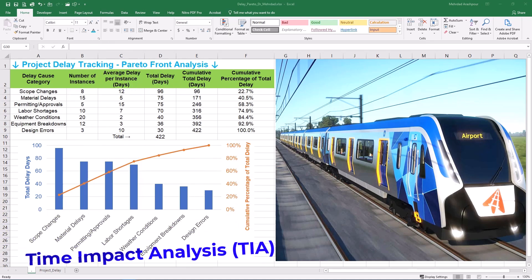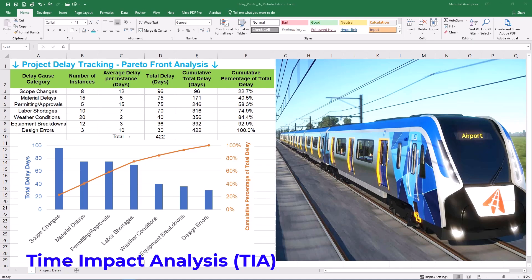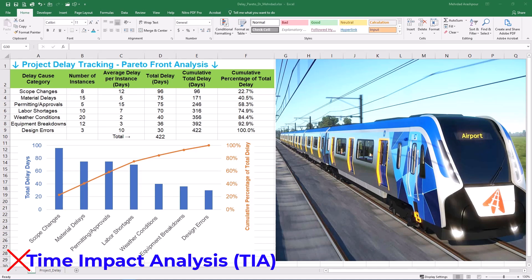Next, we have time impact analysis or TIA — a more sophisticated and forward-looking method. TIA analyzes the impact of discrete delay events as they occur. For example, a sudden material delay: TIA assesses how this specific event ripples through the schedule and impacts subsequent tasks and the overall completion date. It's suitable for analyzing the impact of specific changes and can support extension of time claims. However, TIA can be complex, relies heavily on accurate schedule logic, and can be subjective depending on how delay events are modeled.